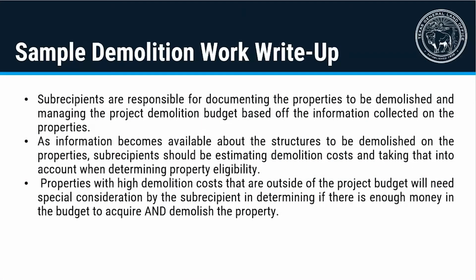Subrecipients are responsible for documenting the properties to be demolished and managing the project demolition budget based off the information collected on the properties. As information becomes available about the structures to be demolished on the properties, subrecipients should be estimating demolition costs and taking that into account when determining property eligibility. Properties with high demolition costs that are outside of the project budget will need special consideration by the subrecipient in determining if there is enough money in the budget to acquire and demolish the property.